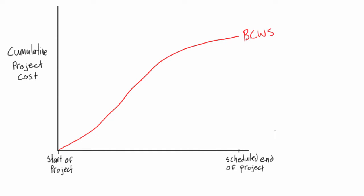BCWS is the budgeted cost of work scheduled. If we have a table of dependencies and make a Gantt chart off of it, and then have the stacked Gantt chart, we get this S-curve by adding up the daily costs of each activity. This is the budgeted cost of work scheduled because the Gantt chart is what we're expecting the project to be, but sometimes it doesn't always go as planned.